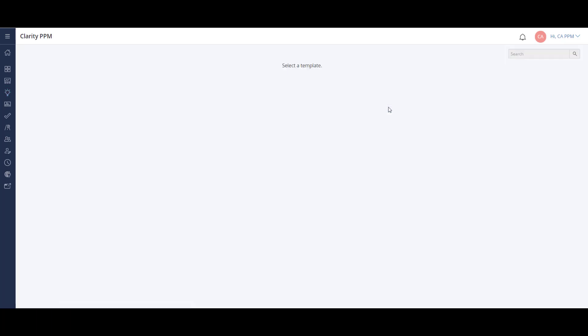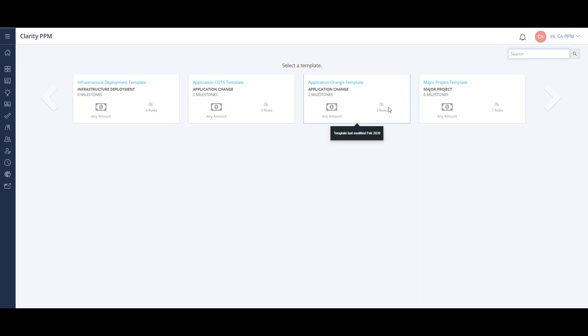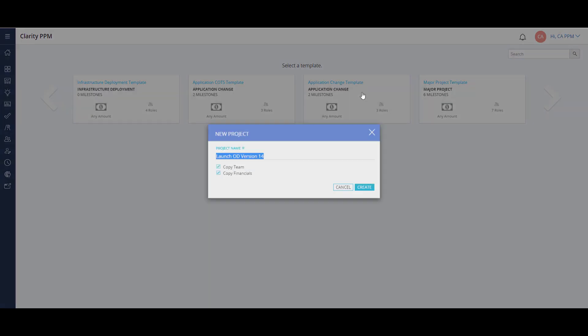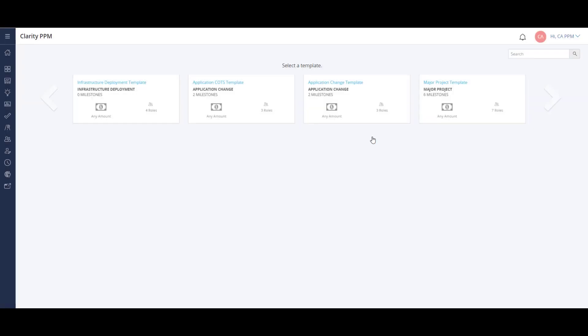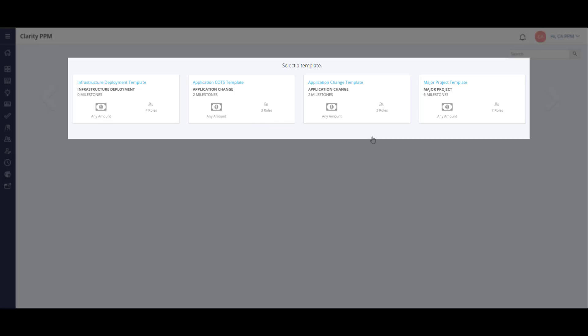During this process, I can select a project template and bring over all the information already created on the idea. The project template contains details of the project framework, like project roles and a project work breakdown structure or tasks. I'm able to use an out-of-the-box template or one of the custom templates created for my company.